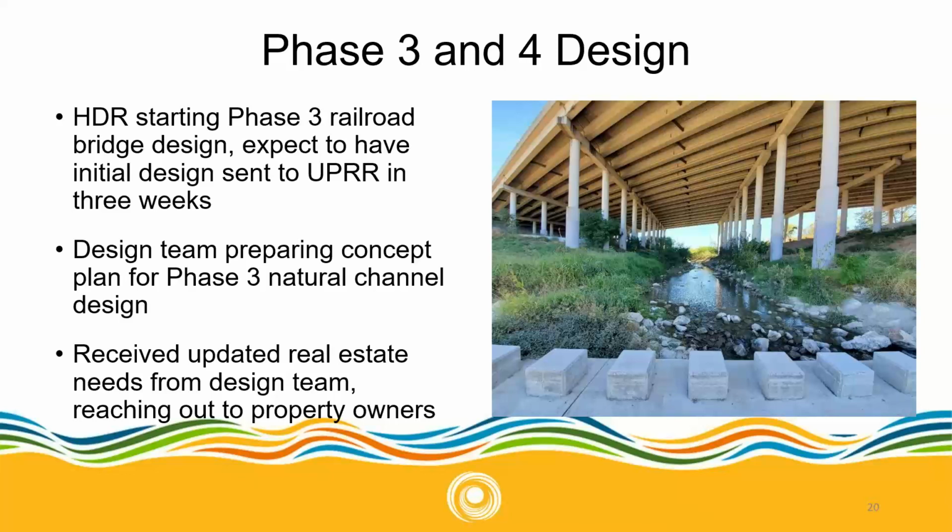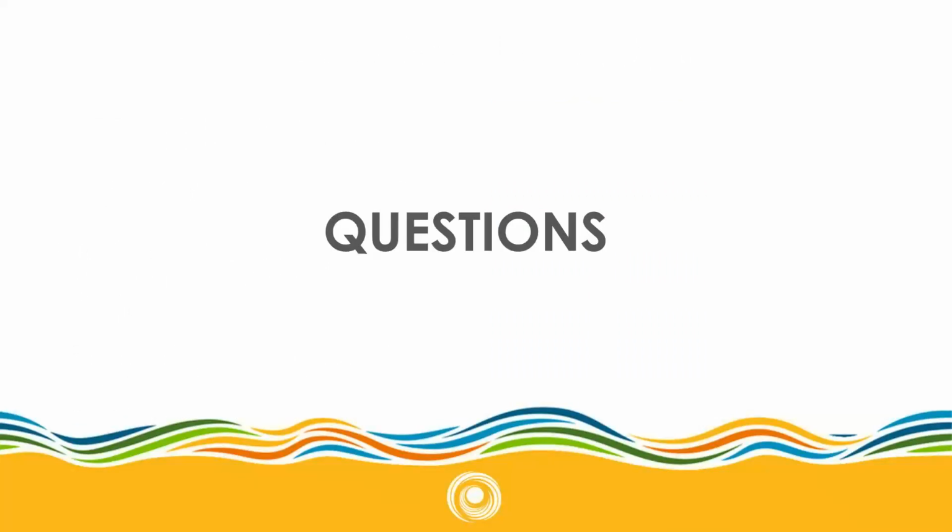Phase 1.2, as of right now, we have an estimate of a final completion of July of 2022, but that really depends on us getting the decision by the Corps by the end of March, and what that decision is. Different designs require different options that were presented, have different levels of redesign that need to be accommodated. So that will obviously impact our schedule. But as of right now, our estimate is the middle of 2022. So we'll keep you posted on that as the 106 process develops. Next slide, please. I believe that is the end of my portion.